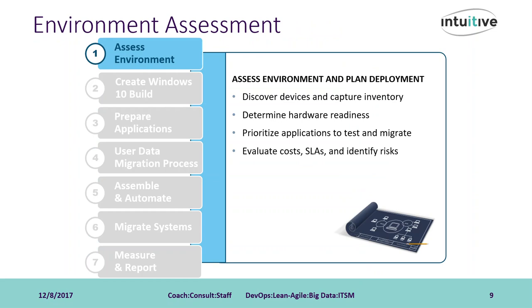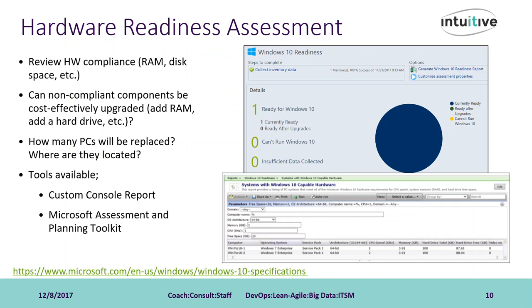Once you have gathered all the hardware information, you know what efforts will be required to go forward with the Windows 10 migration, along with the software application migration plans. It's time to evaluate the cost associated with getting it done. Remember to be mindful of things like internal SLAs to the business lines and re-examine your project plan one last time, looking specifically from a risk management perspective related to your project deliverables.